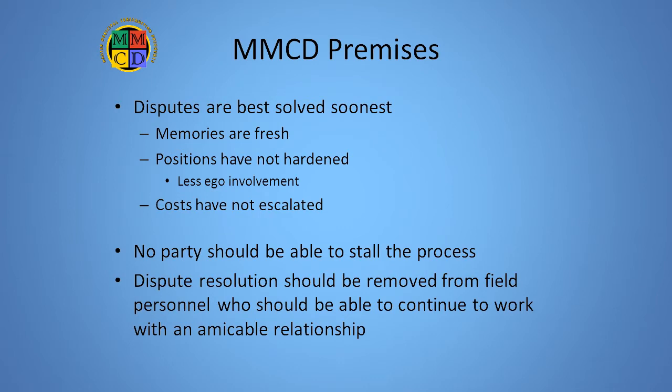When designing the MMCD dispute resolution process, we work from three basic premises. Number one, the sooner a dispute is addressed and resolved, the less damage it does to schedules, costs, and working relationships.